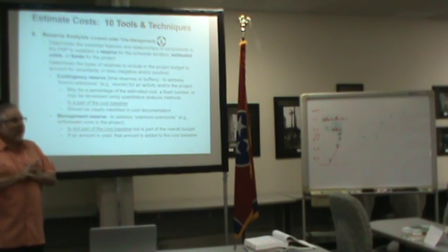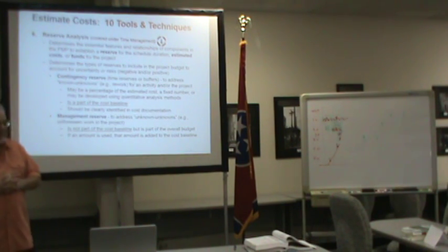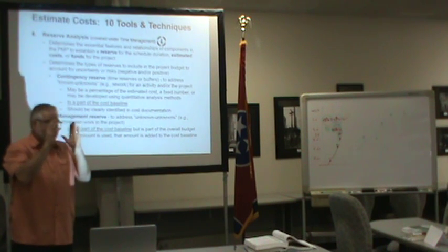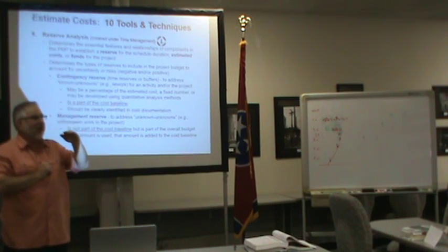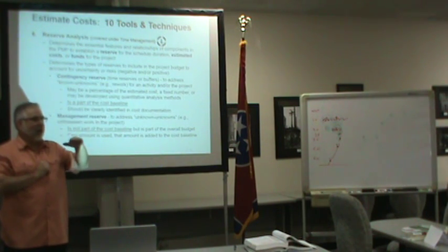One thing that I've seen companies do a lot of times to make themselves more competitive is to publish a very well thought out list of assumptions and then go low on the reserve, and then change order to death. Hey, and that's fair. That's fair, and that is a great point, because now you're talking about the business part of running projects and running a company.